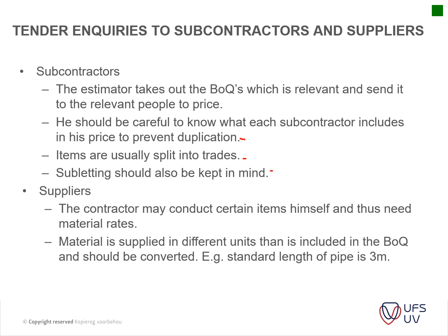Then the suppliers, the same principle applies to that. He sends out his BOQ for the material rates to suppliers as soon as possible. Then the material is supplied in different units than what is included in the BOQ, so you need to take that into consideration.